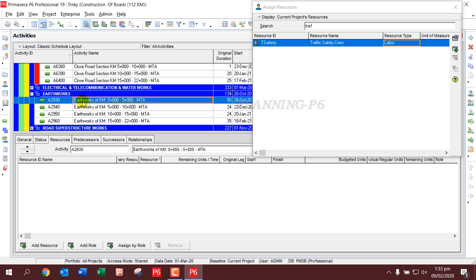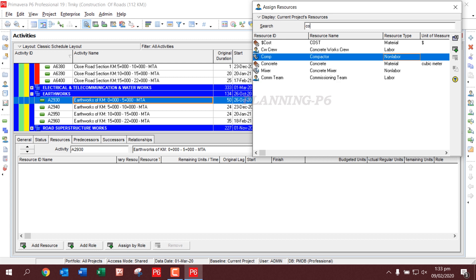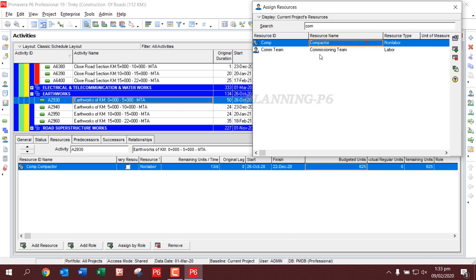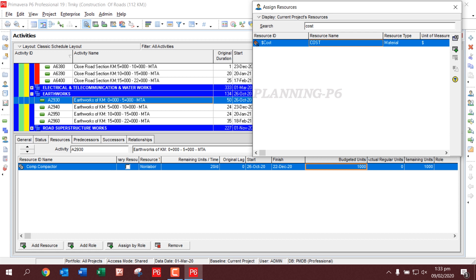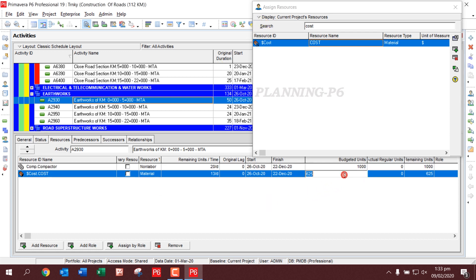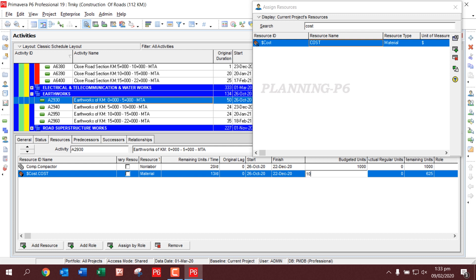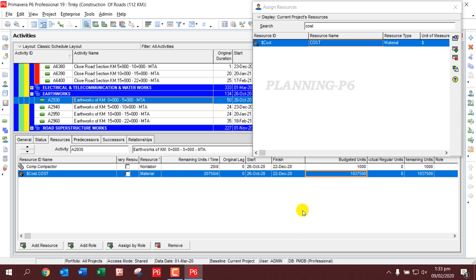For the Earthwork activity, we again use different resource types. First we assign a Compactor with a budget unit of one thousand. Then we assign the cost resource — the cost of this activity according to the contract is one million, thirty-seven thousand, and five hundred dollars.